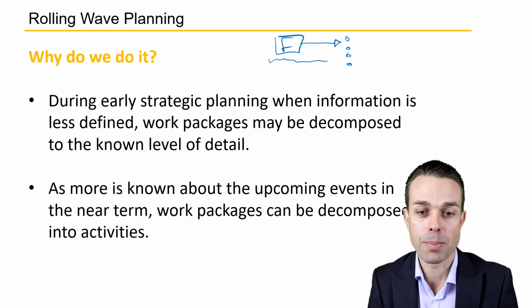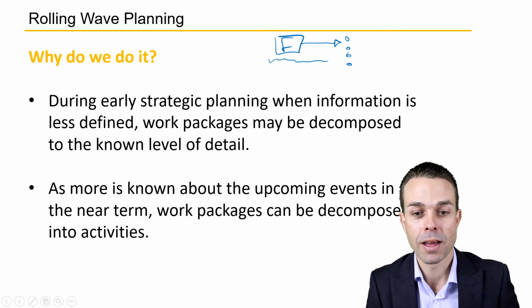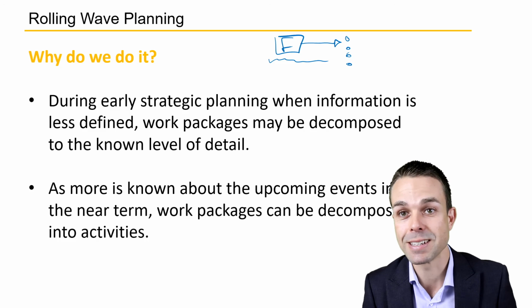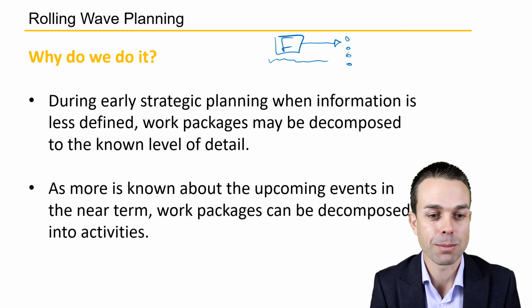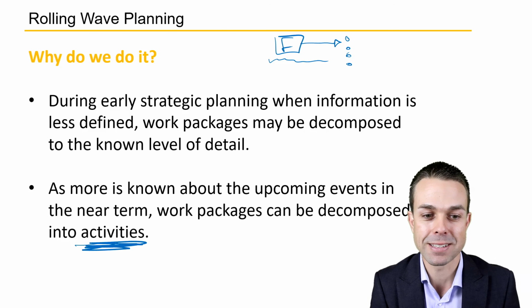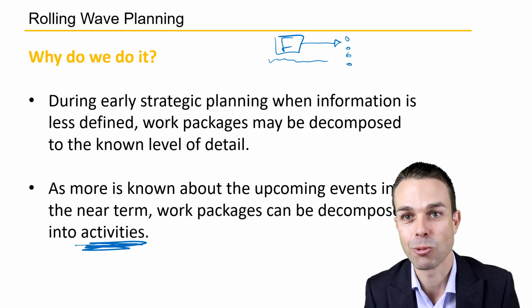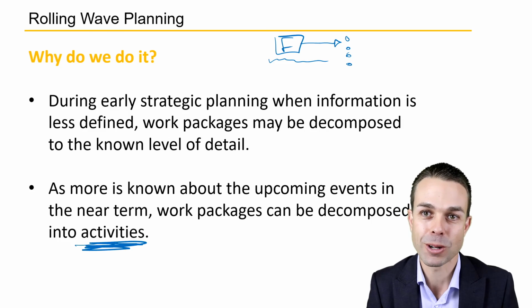As more is known about those upcoming events in the near term, then those work packages can be decomposed, and that's that key term from the PMBOK guide. They can be decomposed into the actual activities that we will perform to get that work done. And that is rolling wave planning.